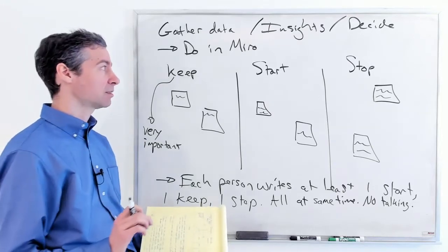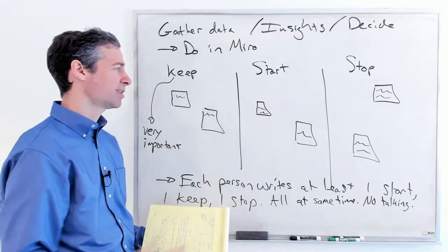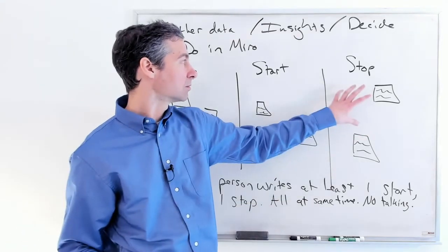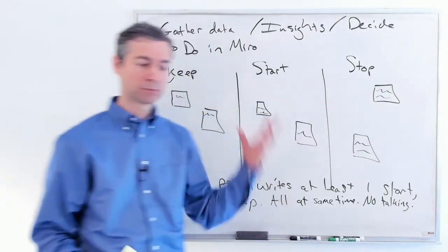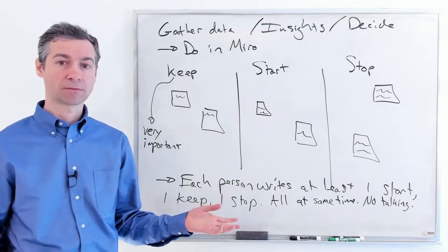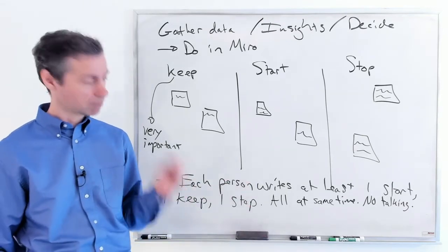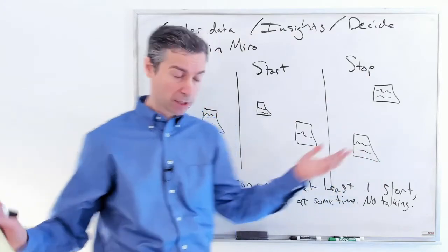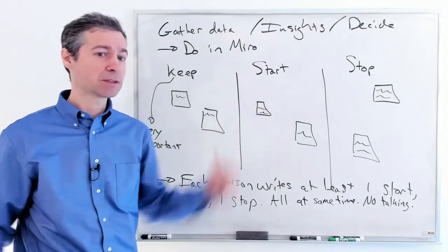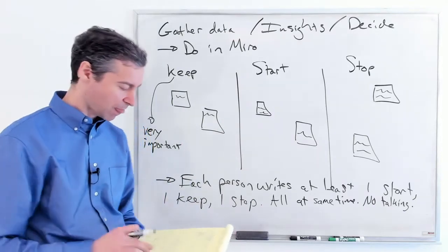Don't phrase it as, that person needs to do something. You're going to put a sticky on there that, we're going to say, stop. You just put it down, stop missing stand-ups. No need to call out who is missing the stand-ups. It's just stop missing stand-ups. Okay. Start being on time to meetings. All right. Don't need to say who is always late.